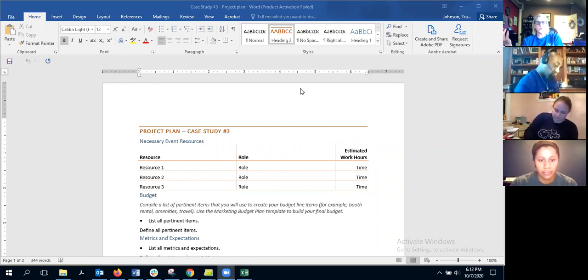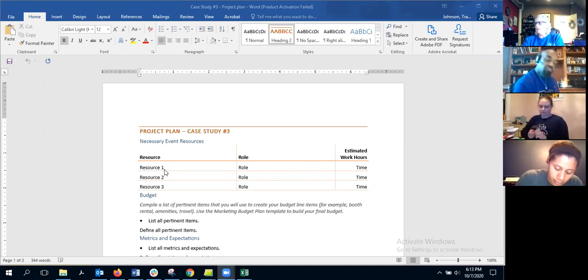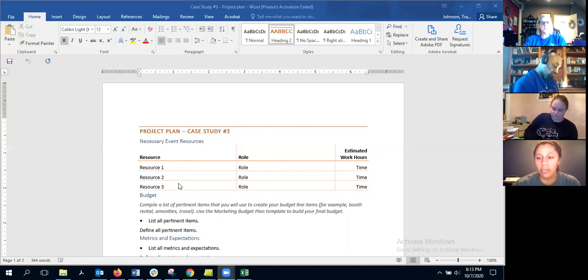So you're going to list your resources, what role those resources are, and how much time you think you're going to spend on it, okay? So for example, if I'm going to invite the religious leaders and pastors in my community to come to the school, and I want to do just a nice little luncheon for them, well, one of the things I'm going to need is food, okay? So food, and that's just part of the supplies we need, and I'm going to get my administrative assistant to help me, so I'm probably only going to spend like 15 minutes on it, okay? So you're just going to list 3 resources that you would need to use. Now, in reality, if I were really planning an event, there's going to be way more than that, but I'm only asking you to do 3, okay?